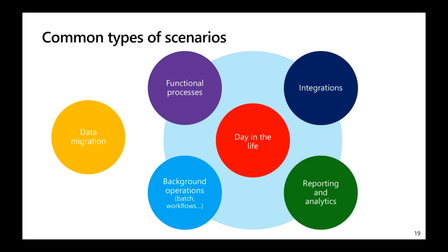A separate scenario to cover is data migration performance. When planning a data migration, it's important to understand the business requirements for the data being migrated. Implementation teams sometimes decide to migrate far more data than required and then run into performance issues due to the size of the data set. There are, of course, many other reasons for poor data migration performance. This is the reason why testing is so super important.